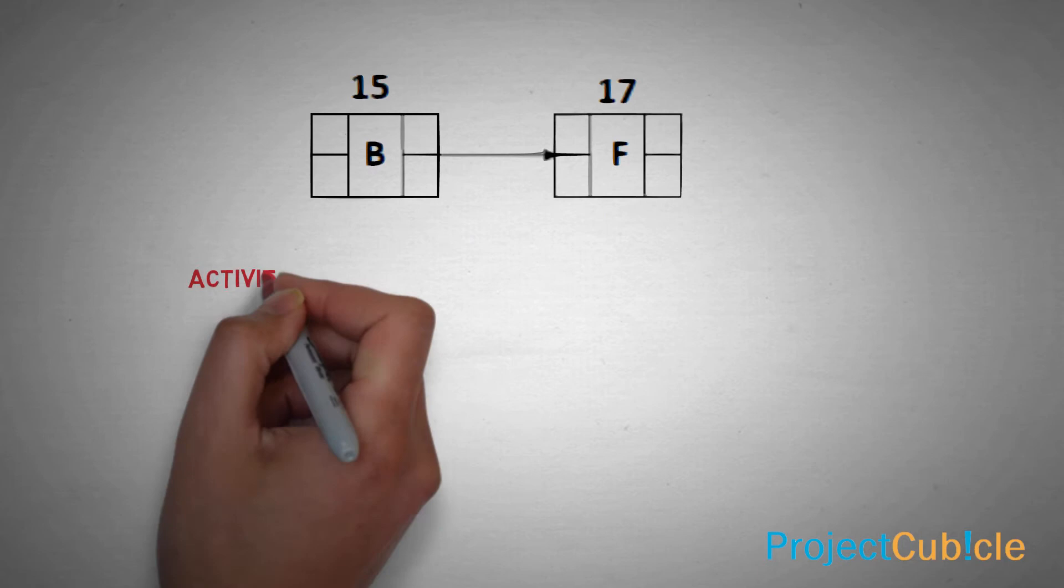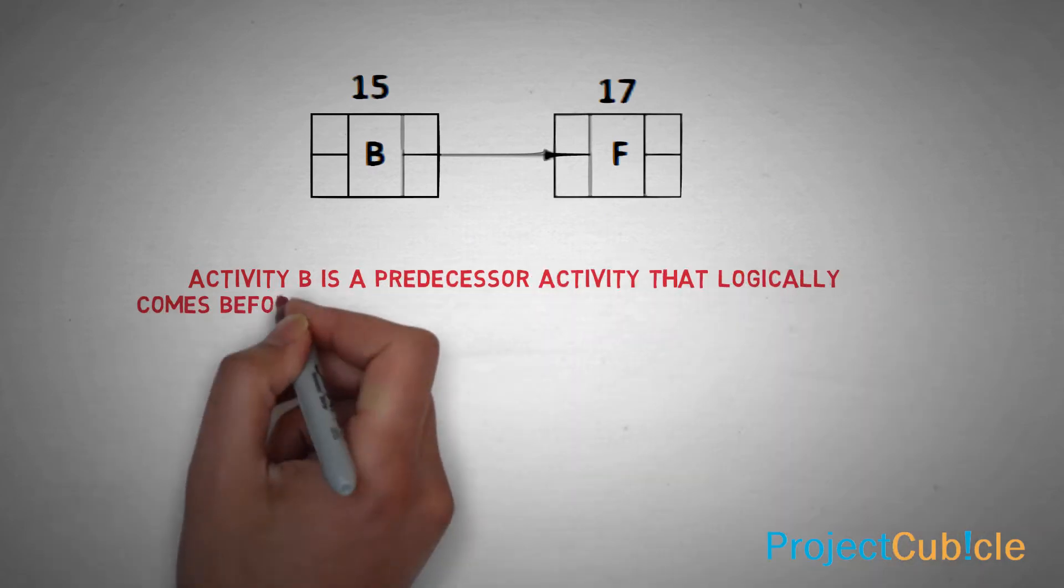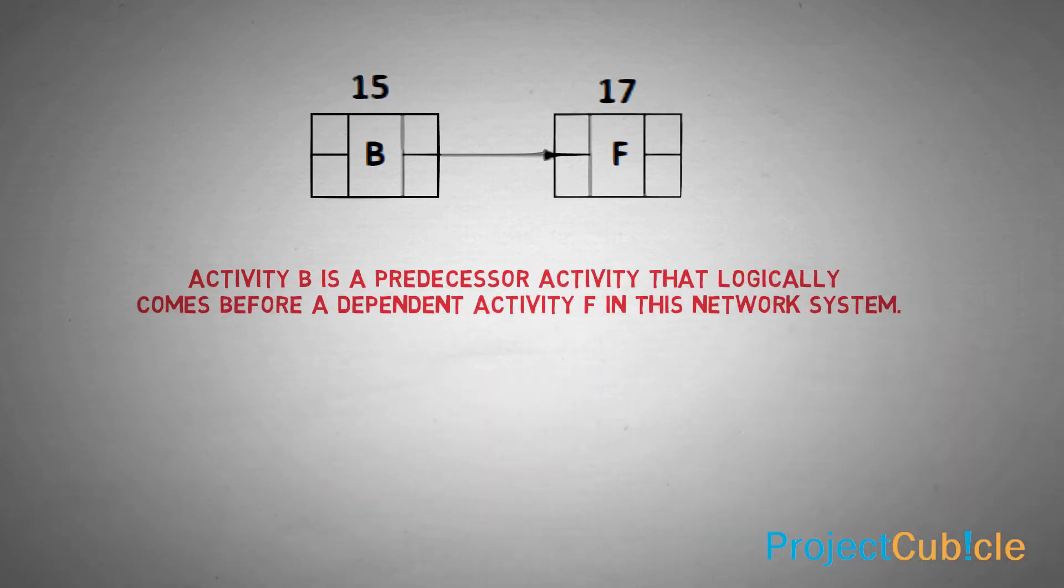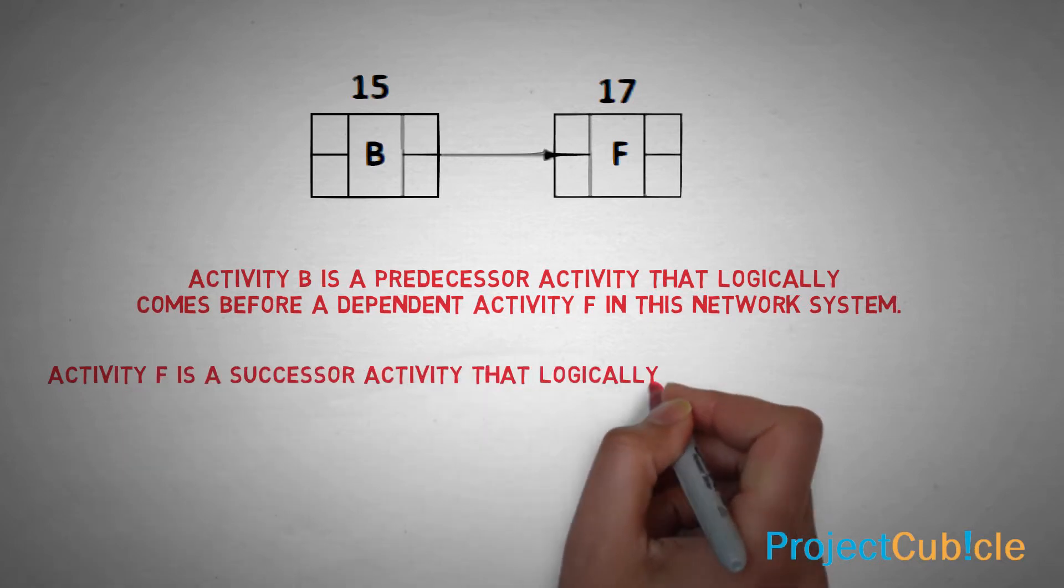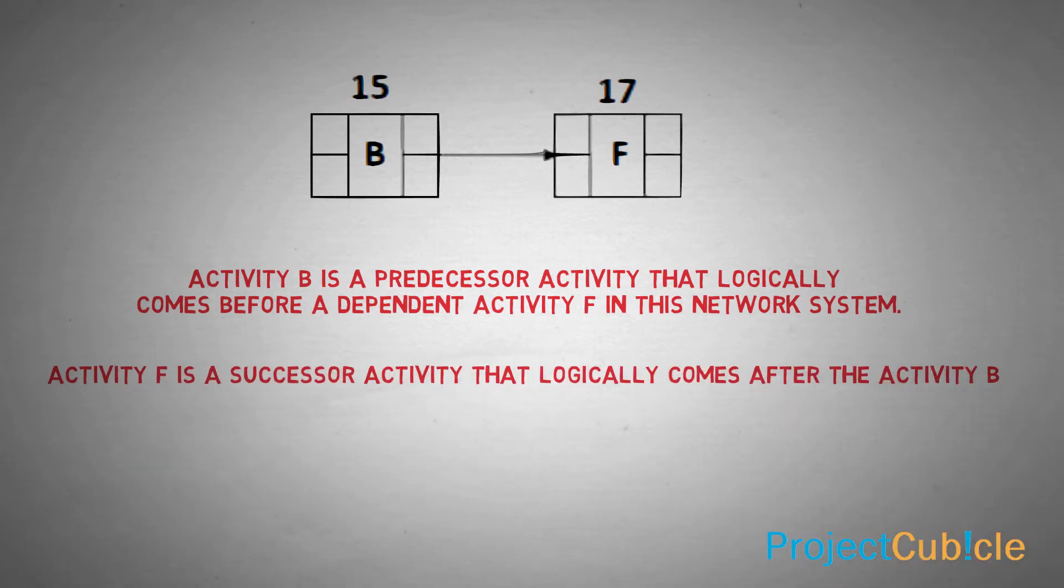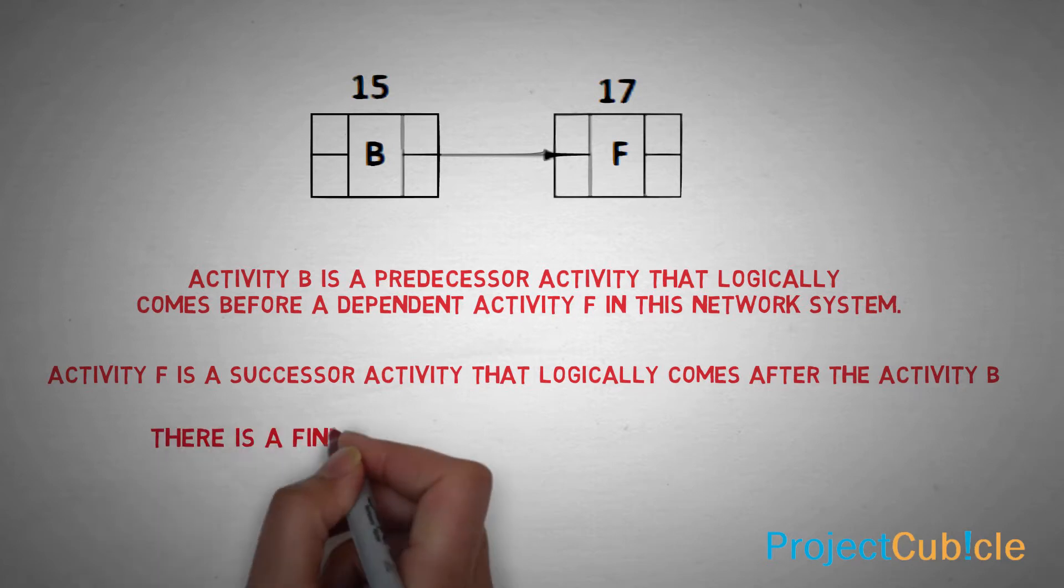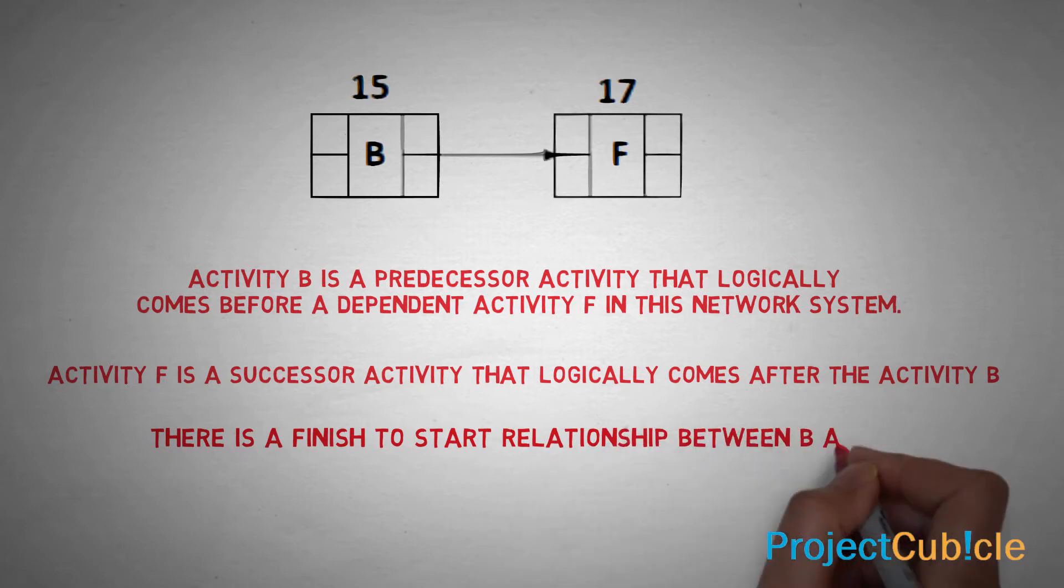Activity B is a predecessor activity that logically comes before a dependent activity F in this network system. Activity F is a successor activity that logically comes after the activity B. There is a finish to start relationship between B and F.